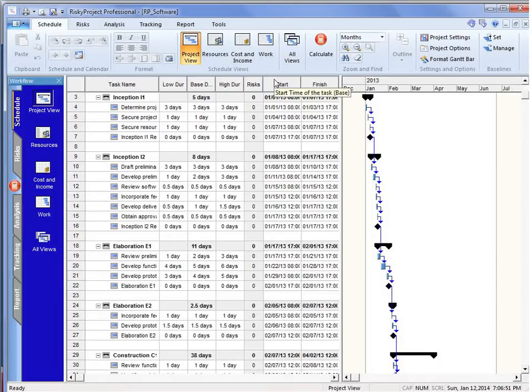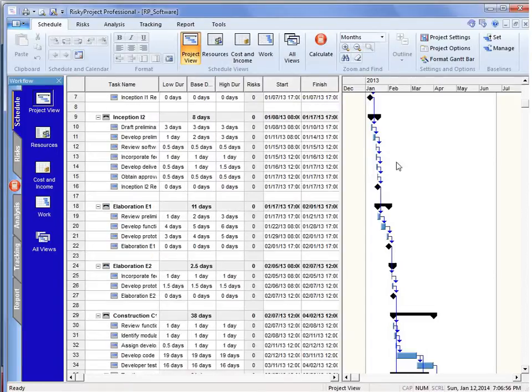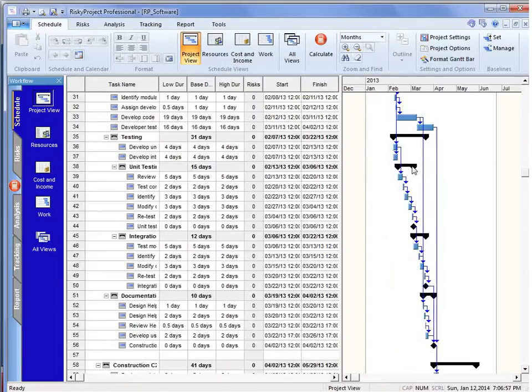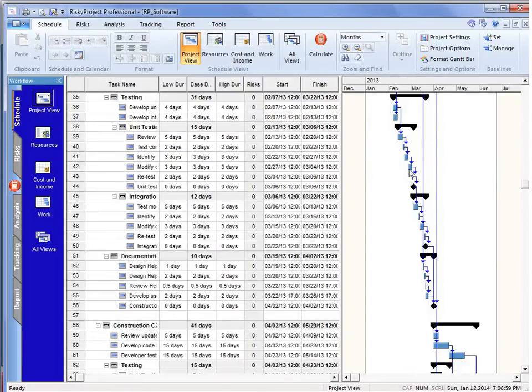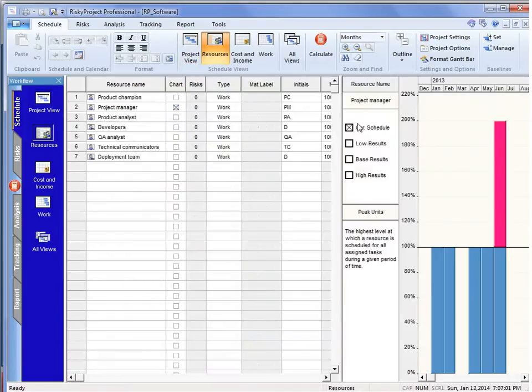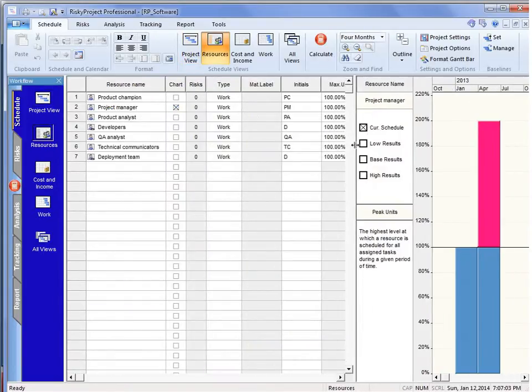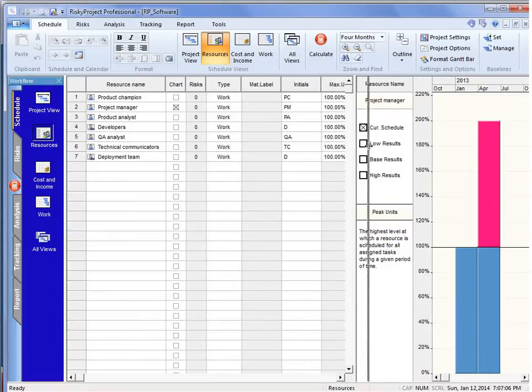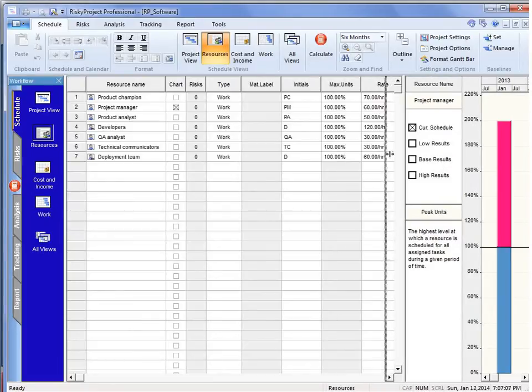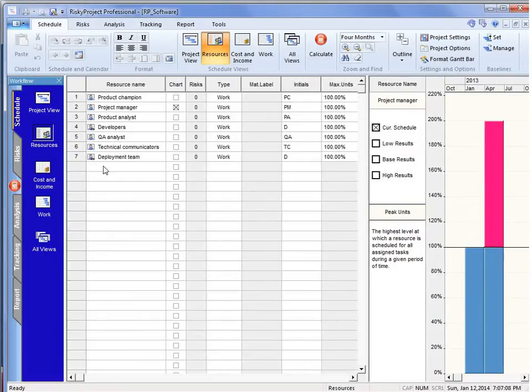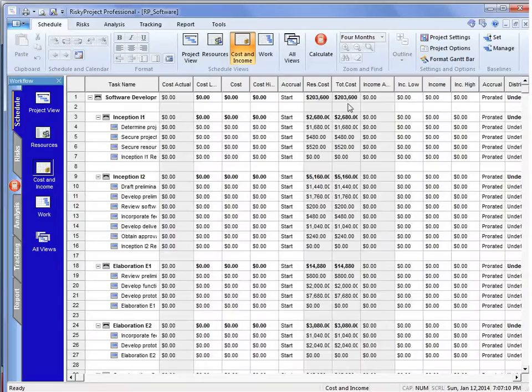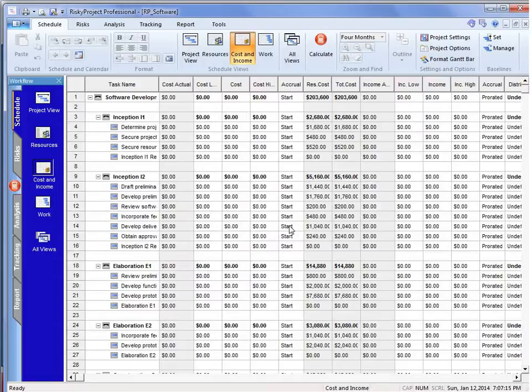So if you look in RiskyProject, we have a software development schedule here with multiple phases, construction. We have some resources that are associated, that have been assigned to various activities with costs. We don't have any fixed costs in this one, so all the costs are being resource-driven. So the risk will be time-dependent costs.